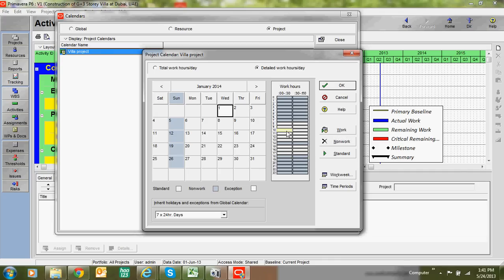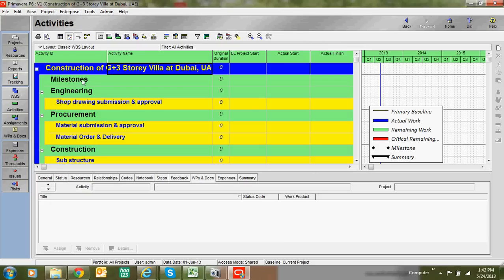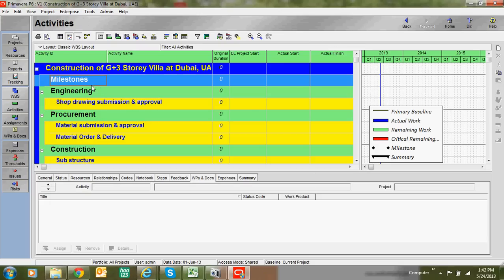Counting the hours including lunch, it comes to 10 hours total. We assign 10 hours, specifying when work will start and finish and what the lunch break is. We can assign these details here. Click OK — we have now assigned our own custom calendar.